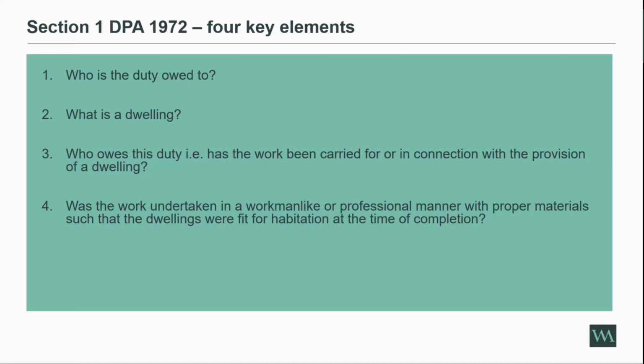There was a case on this in 2014, which was probably the leading case on the DPA interpretation. The case, if you're interested, was called Rendlesham Estates v Barr. And it would be negligent of me not to flag that was a Walker Morris case that we ran a few years ago. But that has said that to fall within the broader category, the common parts must be either physically or functionally connected with the relevant dwelling. And when you're looking at big blocks of flats, it goes without saying that your external walls will fall within that remit.